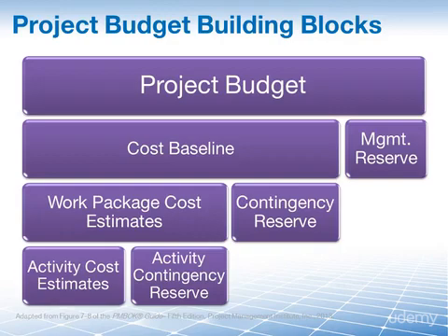As stated in the definition that we just reviewed in the previous slide, we know that the cost baseline does not include any management reserve. The cost baseline is separate from the management reserve, but when the management reserve is used, it must be added to the cost baseline. We know that the cost baseline can only be changed through formal change control procedures. Thus, only when the change is approved can the cost baseline be updated.